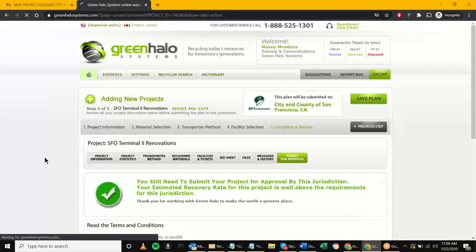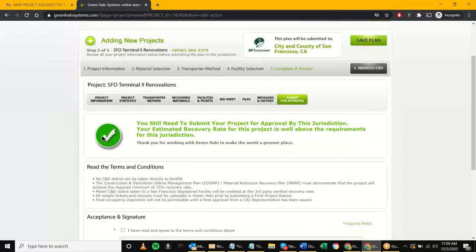Moving on to the next step, this is what James was talking about: it gives you three notices. A green check mark means you're good to go. An exclamation point means you're barely okay but we recommend going back and revising. A red X means — for example, the project got 62% but the requirement is 65% — you're not going to hit the minimum, so it guides you to go back to source-separate materials and choose higher-diverting facilities.